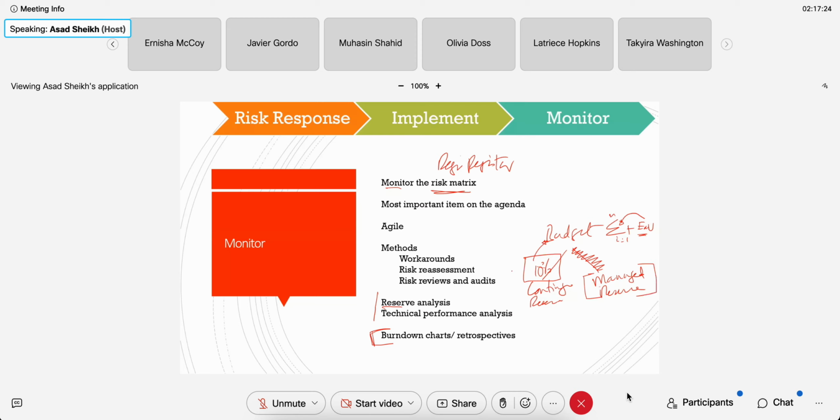And so it's a risk, right? It's a risk if you have used up your contingency reserve, which is also sort of a risk mitigation thing. You mitigate your budget risk by having some extra money there called contingency reserve. Let me just write this down: CONTINGENCY. So that's how you mitigate your budget, by having contingency money added to it.